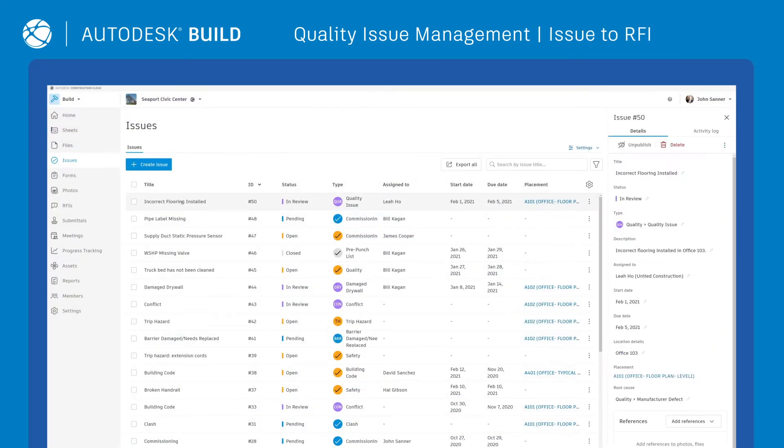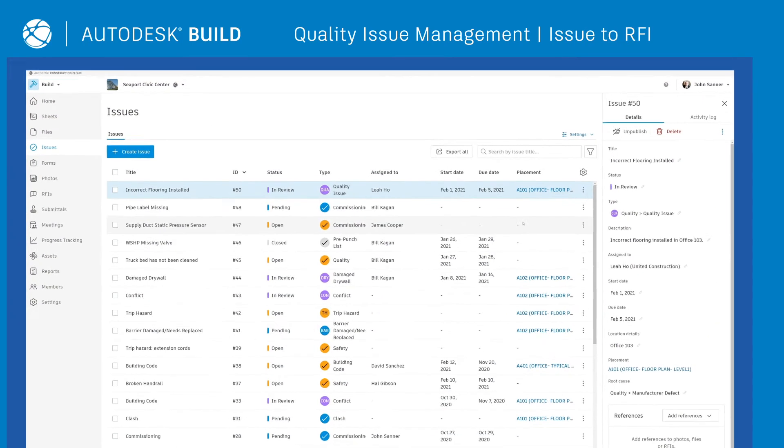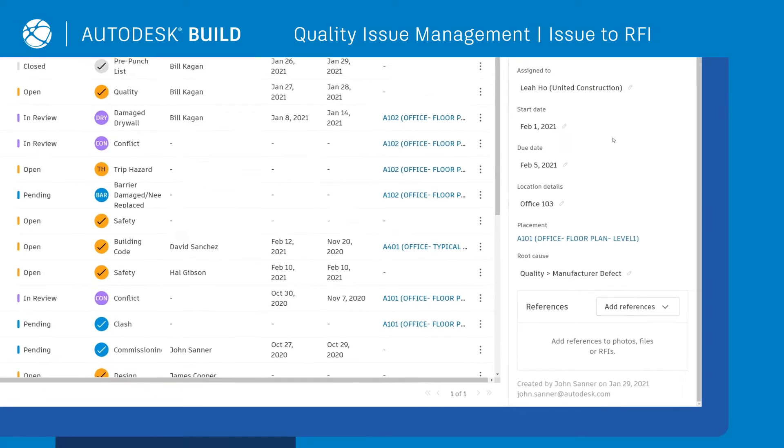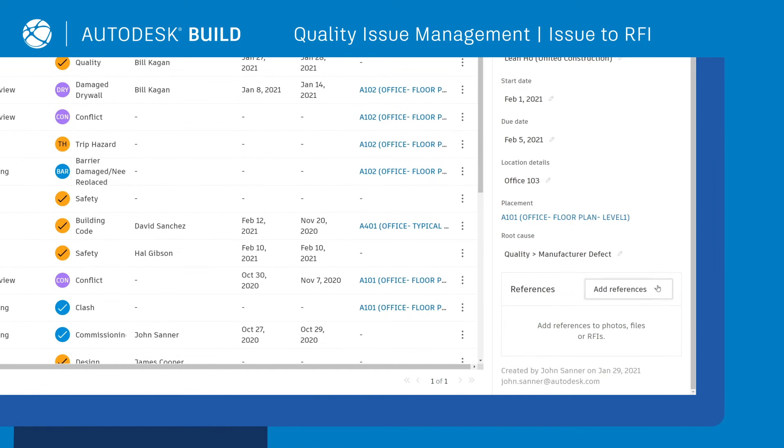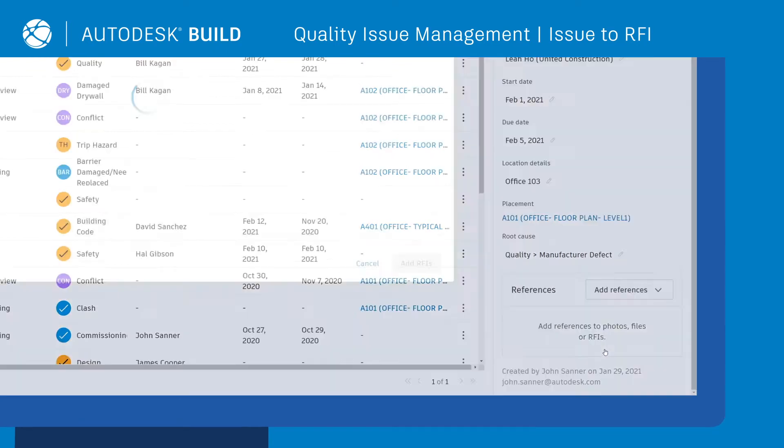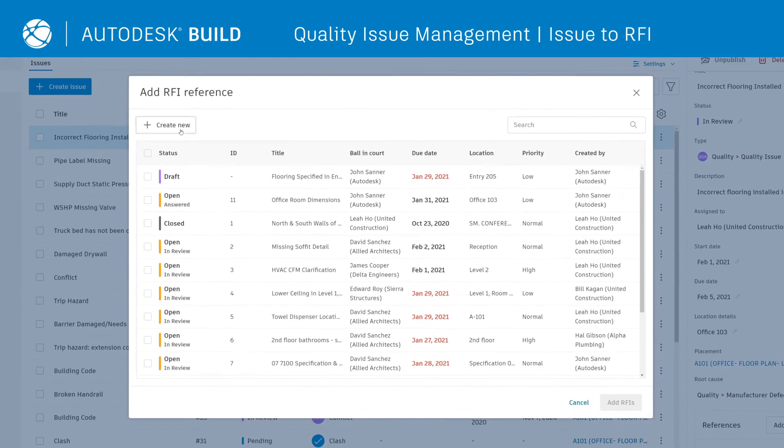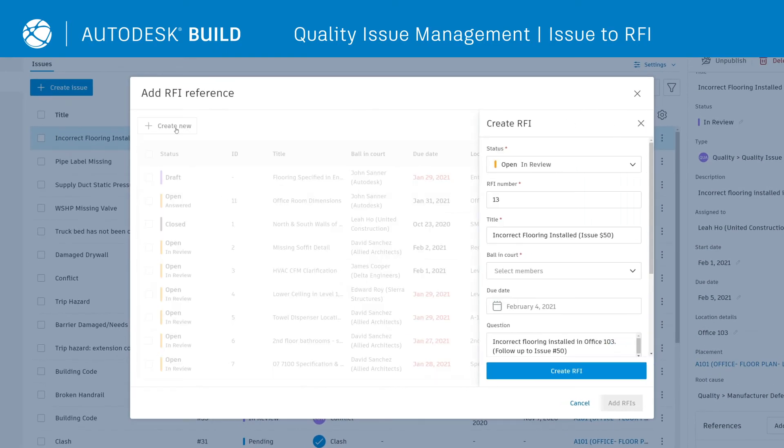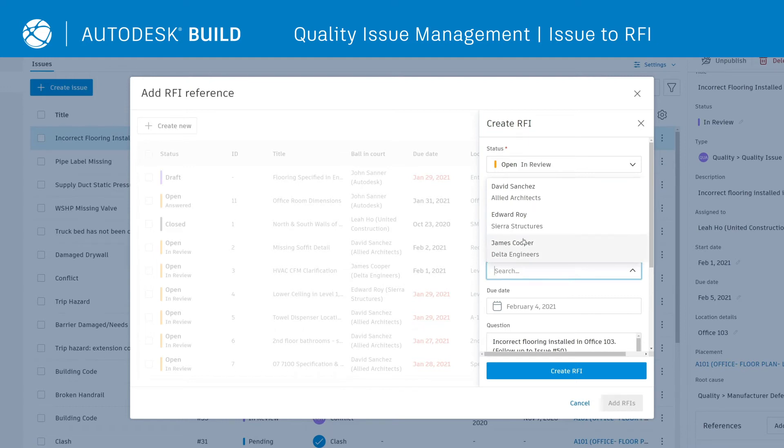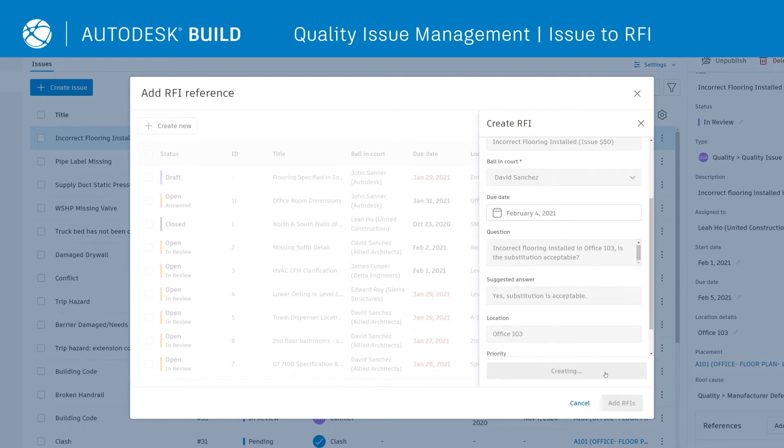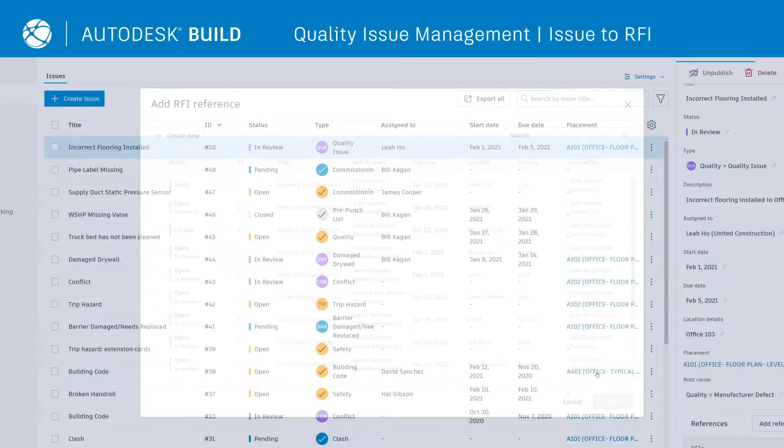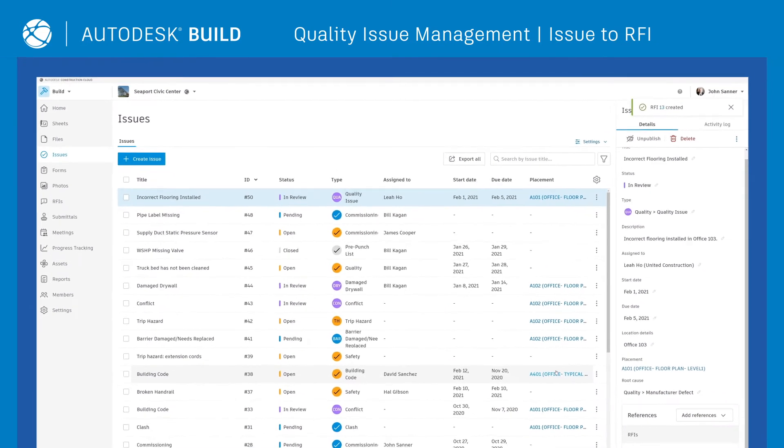Since quality issues often turn into more formal RFIs, through a single click, teams can escalate any issue to an RFI. This connected workflow saves time and increases transparency across the entire team.